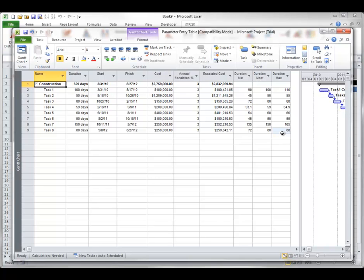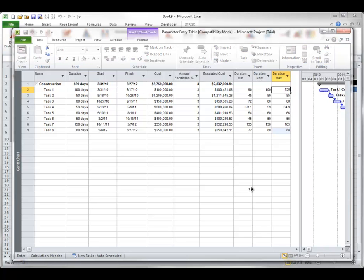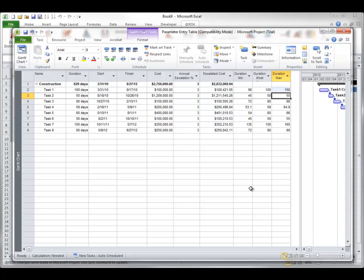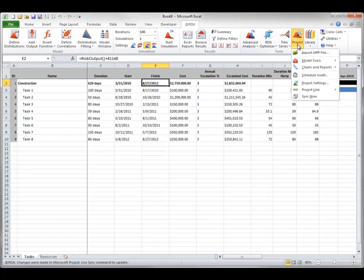From here, schedulers can enter their estimates without having access to your Excel model. For example, a scheduler might change a value to 150. Later, when you reopen your Excel workbook, the MPP file will automatically be opened and its new estimates will be updated to your Excel spreadsheet. Alternatively, you can select Sync Now from the Project drop-down on the At-Risk ribbon to update your Excel spreadsheet with new values from the MPP file. There is the new value — now they are in sync.